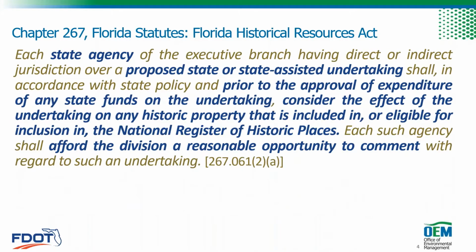But we'll pick back up with Chapter 267. So this is the state level regulations, and they were actually modeled after Section 106. And as a result, the processes for compliance are very similar. So under 267, state agencies must take into account the effects of their undertakings on historic properties prior to the expenditure of any state funds on the undertaking.